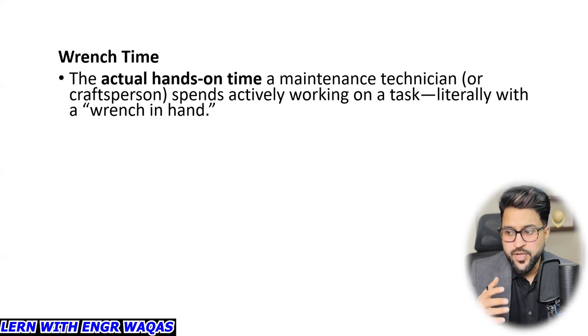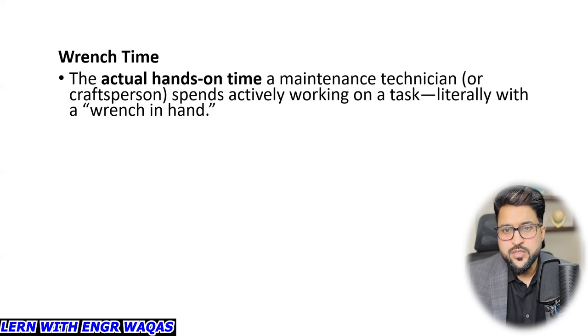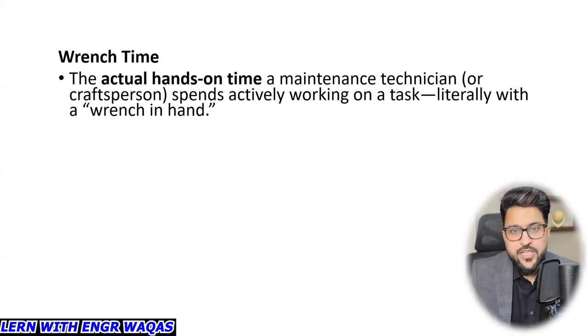They might be going out for the washroom, for dinner, for breakfast, or for any intermittent break. So that is not included in wrench time. Wrench time is the pure time which they spend on overhauling that valve, holding that wrench, and spending time on that maintenance. So that is called wrench time.